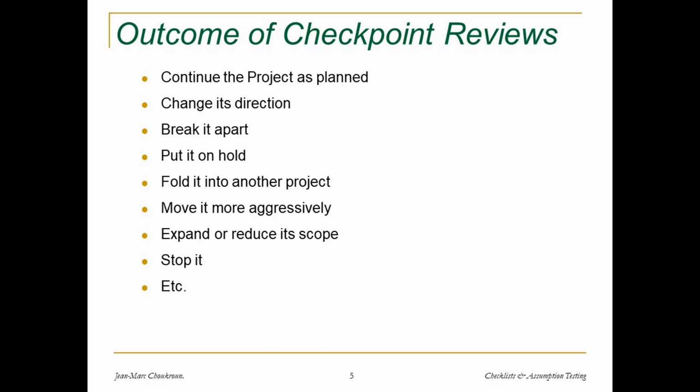Now, how does a checkpoint review work? Obviously you should have an agenda, but you should start with the after action review, looking back and saying, this is what happened, and what did not happen, etc. And as a result of the after action review, these are certain things that we need to do in the next phase. Then you have your meeting in terms of whatever the agenda is supposed to cover. And at the end, before you break up, you do your before action review. In other words, you look at the agenda, at the task plan for the next phase, and then look at what might be potential problems, potential contingencies, and potential actions that you might have to take in order to head off or mitigate those issues if they occur.